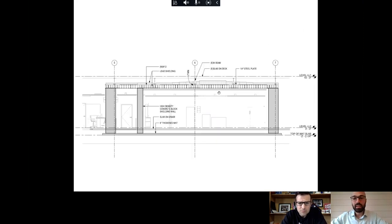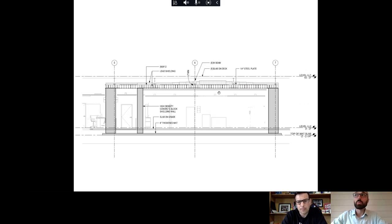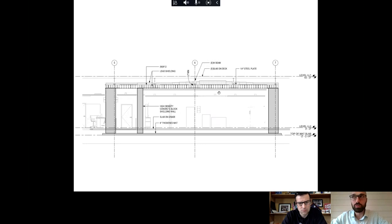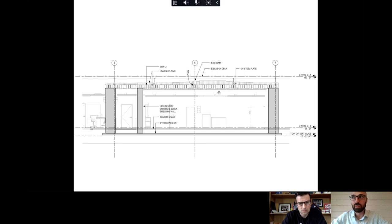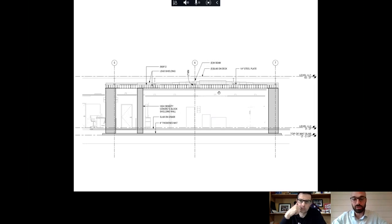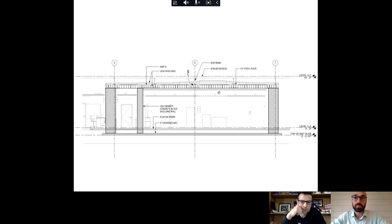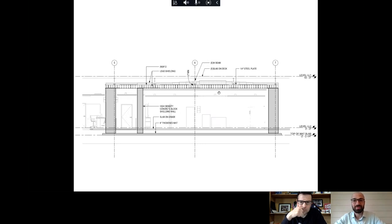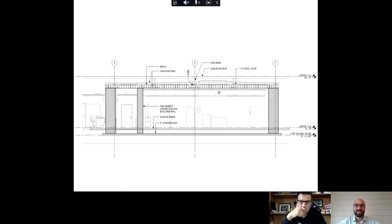We had a value engineering meeting where we had a matrix together with everything that we could do to skinny up the cost of this project. We were around $3 million over budget, and we were looking to cut that number. So we came up with a set of value engineering actions we could take that was only going to get us around $400,000 or $500,000 worth of savings. We got to the end of the meeting that we had with all the project stakeholders, the architects, engineers, and owners, and the end users. And they asked if anybody had any other ideas.